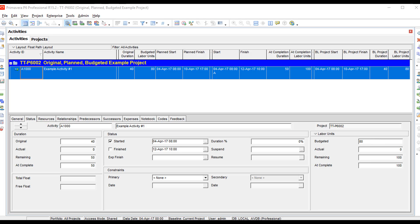What's confusing is that many times there is a misconception that original duration, budgeted labor units, plan start, and plan finish are a target or a baseline. The reality is they are not a true static baseline. We have to create baselines once we get our project plan planned out, approved, and in order. We really don't look at that first set of fields once we've created a baseline.